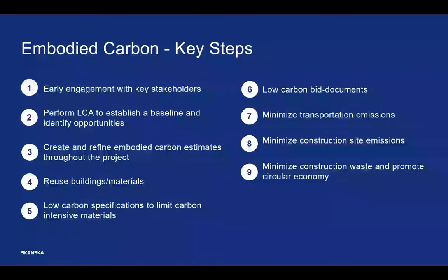To wrap up, the key steps to implement are: early engagement with key stakeholders; performing life cycle assessment to establish a baseline and identify opportunities early on; creating and refining embodied carbon estimates throughout the project; finding opportunities to reuse buildings or materials entirely; establishing low-carbon specifications to limit carbon-intensive materials and low-carbon bid documents; and minimizing transportation, construction site, and waste-related emissions while promoting a circular economy. Carbon offsets are also an option for the remaining emissions that can't be actively reduced — but today we focused on strategies to actively reduce embodied carbon in construction.